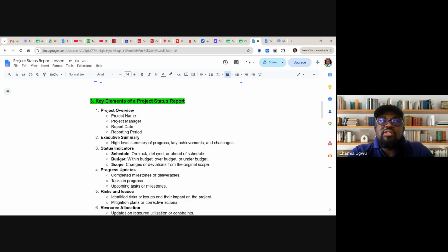They continue to start from the beginning and I told them, no. For instance, if you reported last week, and you're writing the project report for this week, the period you are going to report is the week. Let's say you are submitting your report every Friday by 12 p.m., which is the ideal thing, because it is going to give the line manager or the stakeholder or the project sponsor opportunity to go through the reports and give you feedback depending on the way you are reporting.